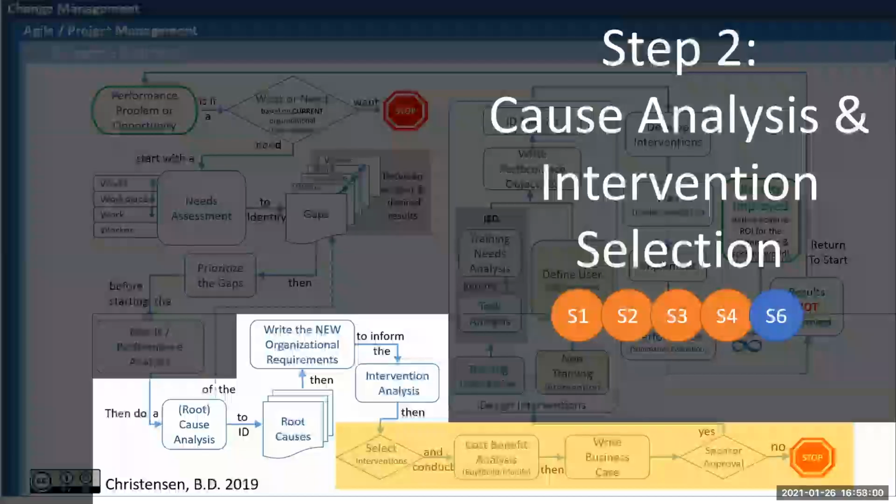And then after you do that, you should write a business case to fully lay out all the costs for designing, developing, and implementing and sustaining it over the long term. And then once that's all done, you present it to the sponsor for approval. Otherwise, you could start doing that design and development work, and the sponsor finds out and doesn't agree with what you're doing and puts a stop to it. So it's better to get that up front, make sure that everybody's on board with the direction that you're headed.